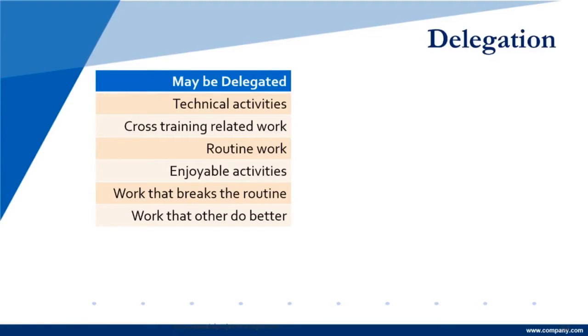You can delegate routine things as a project manager. Routine things may be simple things like phone calls or scheduling or meeting requests or meeting minutes. They can be routinely handed over if possible. Sometimes those things have to be done by the project manager, but the idea is to think, as you put a team together, that you can delegate, and routine things are one of the top things on my list to hand over.